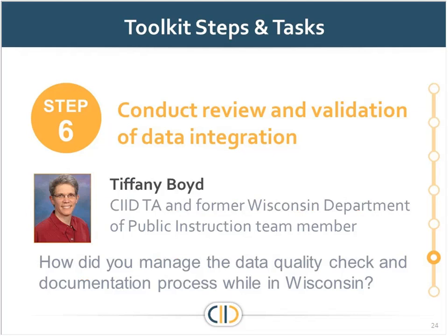Sure. Thanks, Aaron. For this step, I wanted to share just a little bit from our data warehouse project of when we were first developing that. And what we did when we got to the data quality review and validation, we started each time with a kickoff meeting. At that kickoff meeting, we would go over our test plan, the strategy, the roles and responsibilities for each team member, timelines for our review, and we made sure that each reviewer had a copy of the ETL specifications and the requirements for the data warehouse tables.